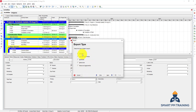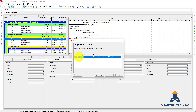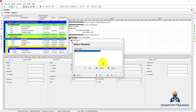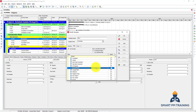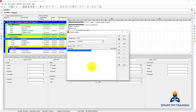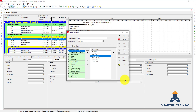You have subject areas to choose from: Activities, Activity Relationships, Expenses, Resources, and Resource Assignments. Select Activities and click Next, then mark the export. Click Next and it will ask you to specify a template. Click Modify — this is a template you can reuse. You can choose which columns you want to see, apply filters, and set sorting by start date or by WBS.